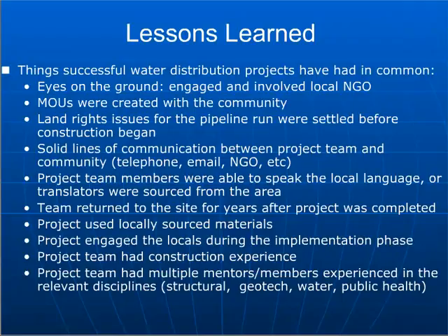You might run into a problem and realize that you can't, for some reason now, you can't fit 15 taps on your distribution line. You can only put 10 taps on the distribution line. Well, it's good to be able to air those ideas with the community and make sure that you've got their support for those changes before you go off and redesign the system and then show up and build something that nobody wants anymore.